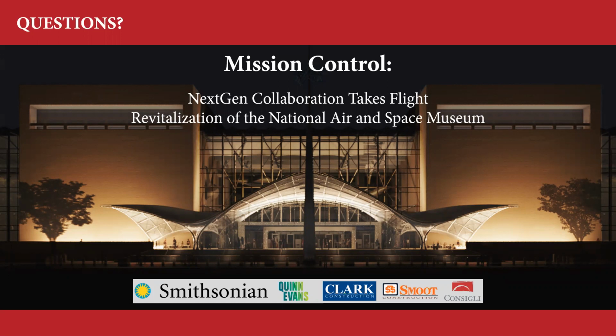There was the design Revisto project that was ever changing. Design was continuing to evolve. Questions were being asked and answered from a, should this be an RFI, should this not be an RFI process? But he was also cruising along with the construction coordination model as well, where the construction team was really going through and answering a lot of their issues as it relates to coordination, not necessarily stuff that needs to be sent to the design team. When it did need to be sent to the design team, that's how it got escalated.